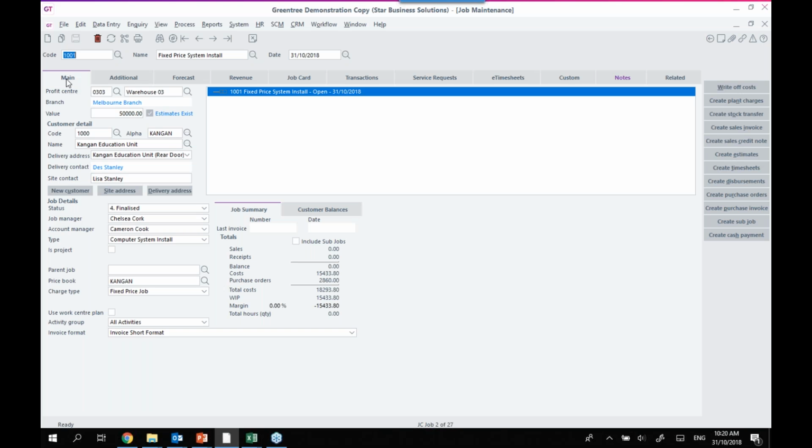So what happens in those situations is, of course, that when you reach those given months, the profitability of a job is very good. But on those months on the lead up in, say, a 12-month project where you can't invoice for the first 3 months, the profitability of that project looks quite low.